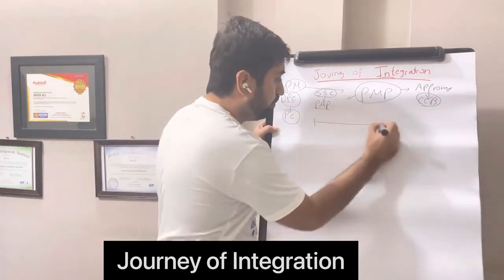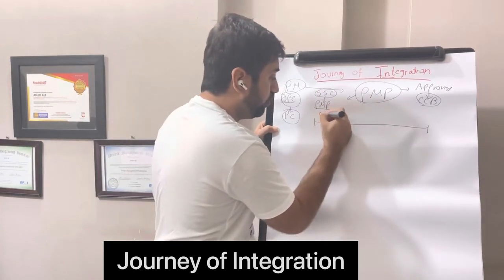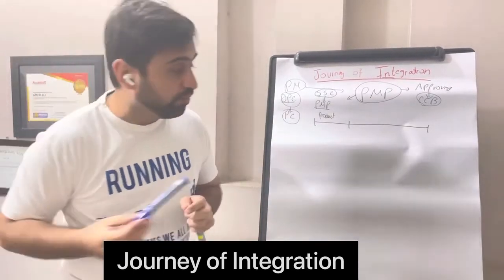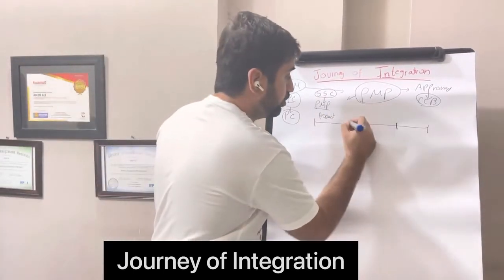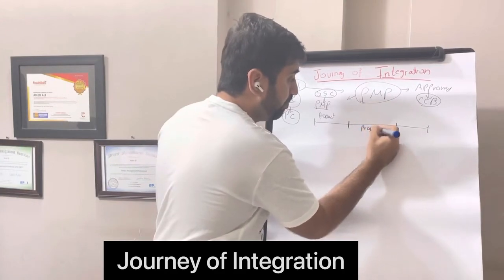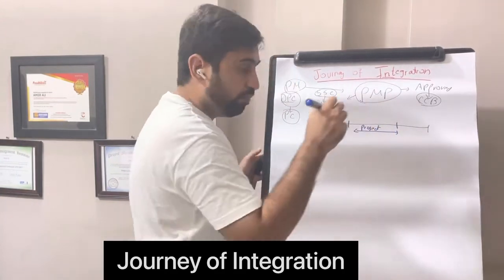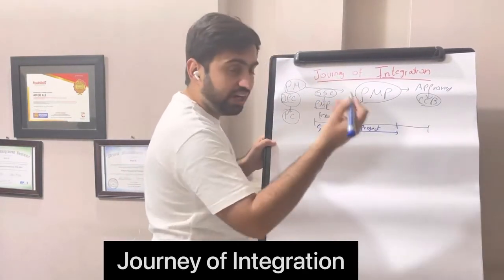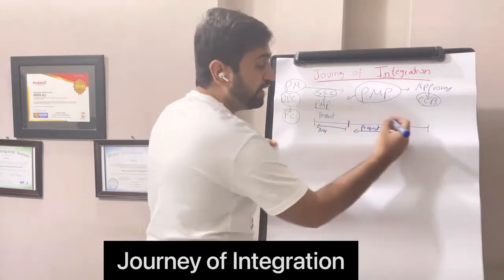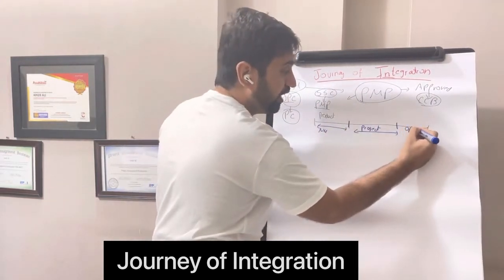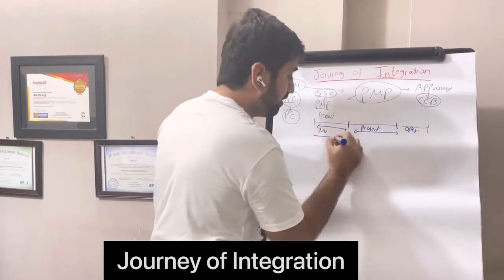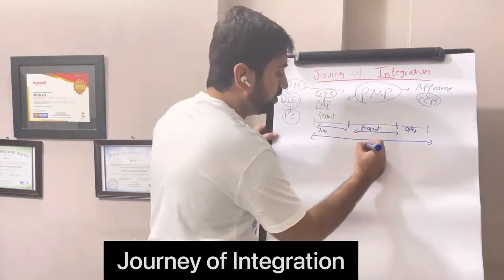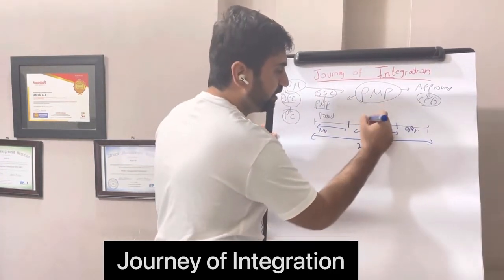We have two things in the project. One is the product life cycle, or product. Second, let me use another pen, is the project. Okay, so the project is a part inside of the product. A product can have initiation like need assessment, how it was started, the business case, all those things, and after the project, operations and the entire life cycle. For example, this can be 25 years. If I take the example of a normal hydro project or a bridge construction project, the project can be 2 to 3 years.